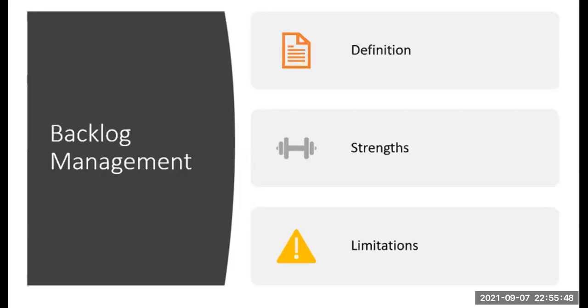For example, if you're working in a 2-week sprint, spend at least 2 to 3 hours on backlog refinement. Even the Scrum guide prescribes that in a 2-week sprint, you should spend at least 2 to 3 hours refining your backlog. When refining, you go through all the features in the backlog and remove whatever is not required.